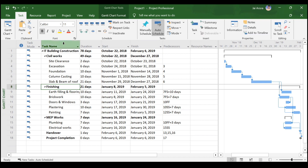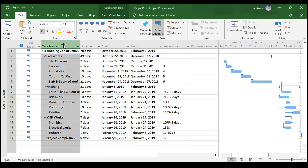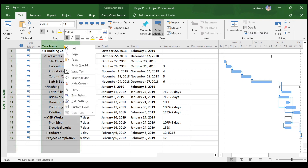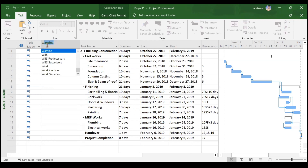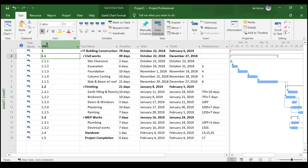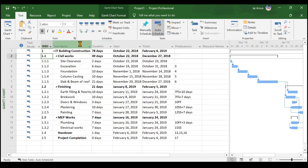First, we need to add a WBS column by right-clicking here and going to Insert Column, then choosing WBS. With this, you can see some basic WBS coding has been generated automatically by default.